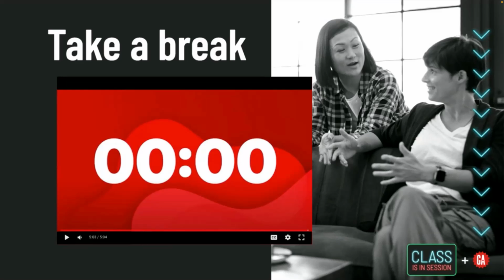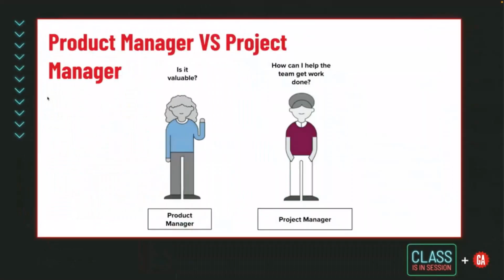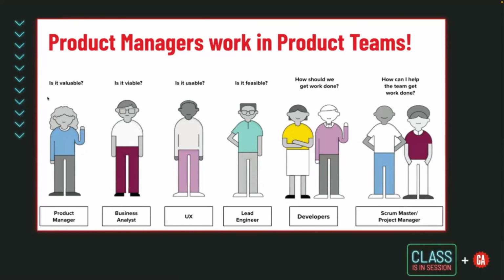So when you look at the product team that we showed earlier, sometimes known as a scrum team, these product teams are generally between 5 to 9 people. That's the ideal size of a team. If you have more than that, it becomes too difficult to keep everybody on the same page. And if you have less, then you're susceptible to things happening like people being on holiday and stuff like that. So 7 to 9 people are the ideal teams.